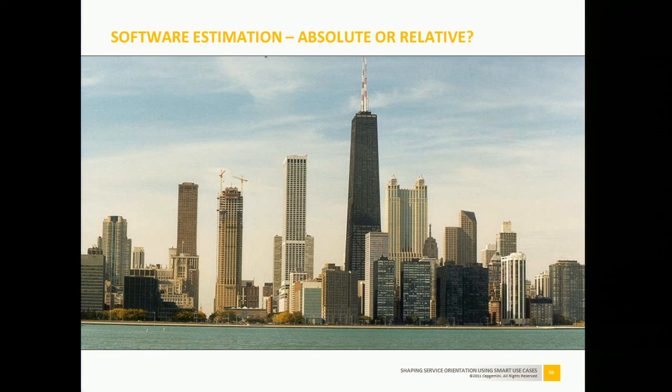And you might think, how rough is this? Is this really accurate? Well, I can tell you, it will be pretty accurate because there's an interesting thing called the law of large numbers. One of the consequences of that law is, if you estimate a whole bunch of stuff on a scale, at some point you will overestimate one of these items.